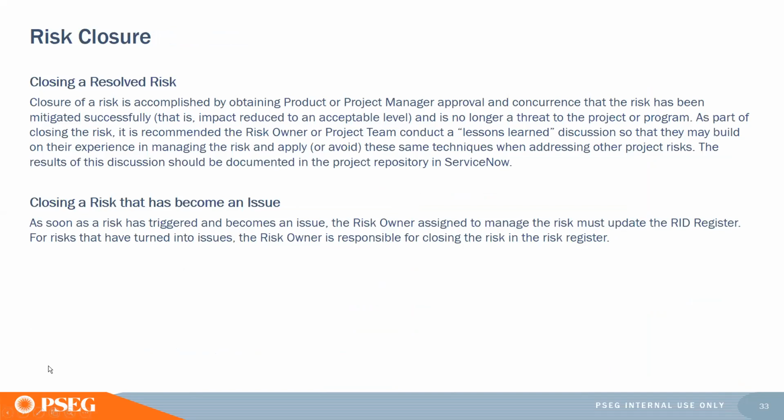So, risk closure: closing a resolved risk. You have developed a strategy to mitigate the risk and you decide to close the risk. The risk is no longer a threat to your project, and you'll definitely want to conduct a lessons learned so that you can document this experience and avoid it with related projects or future projects. What about closing a risk that's become an issue?